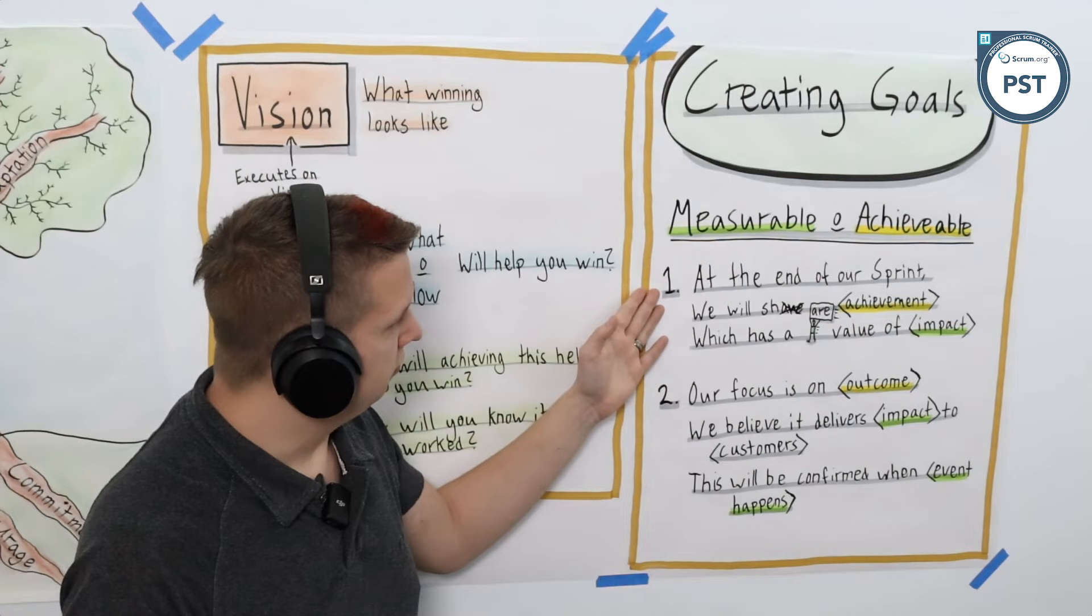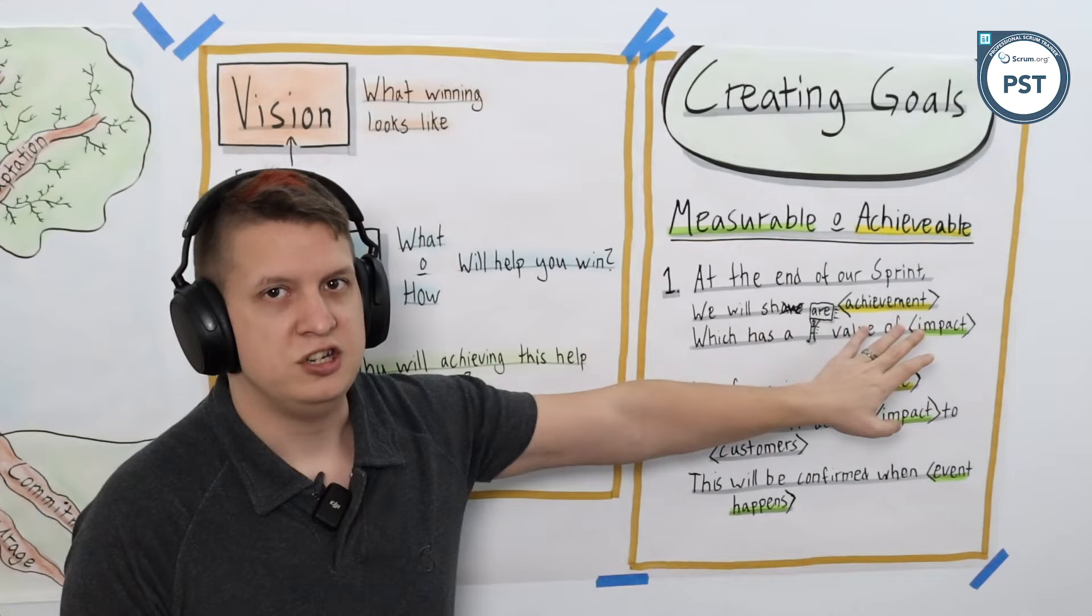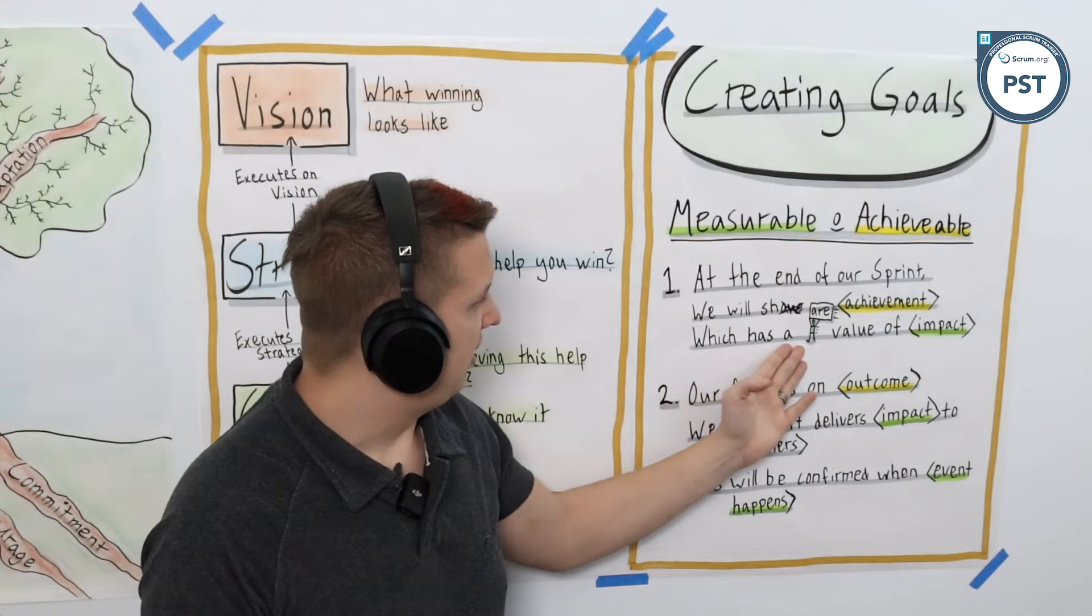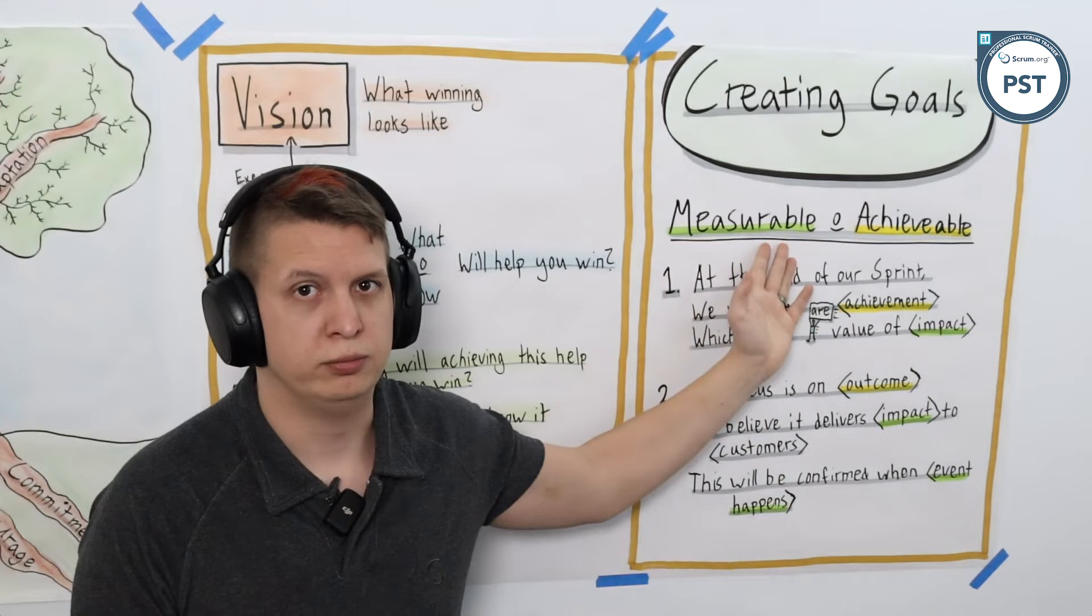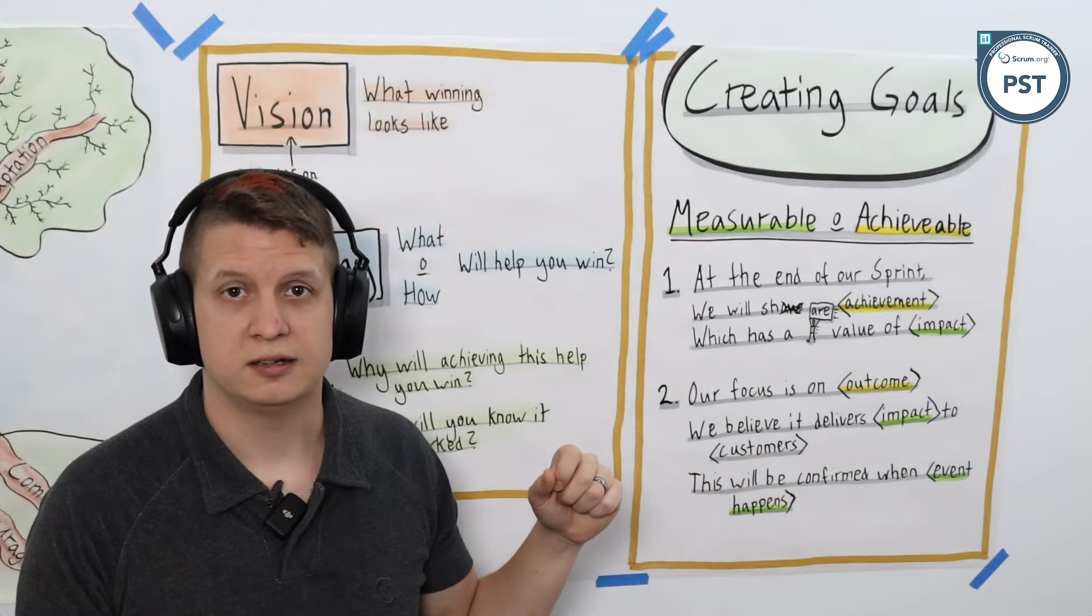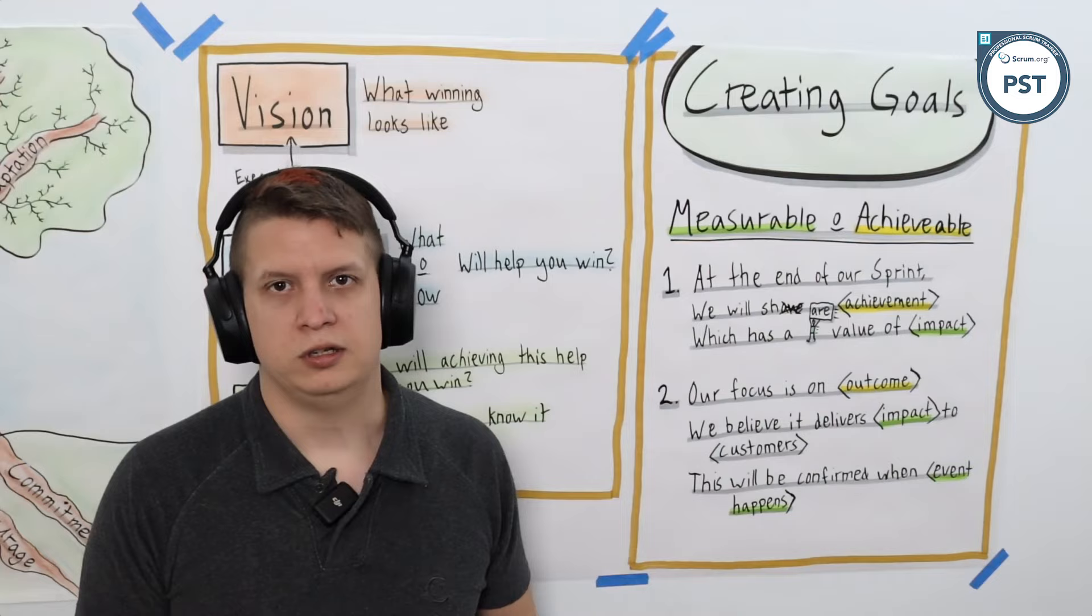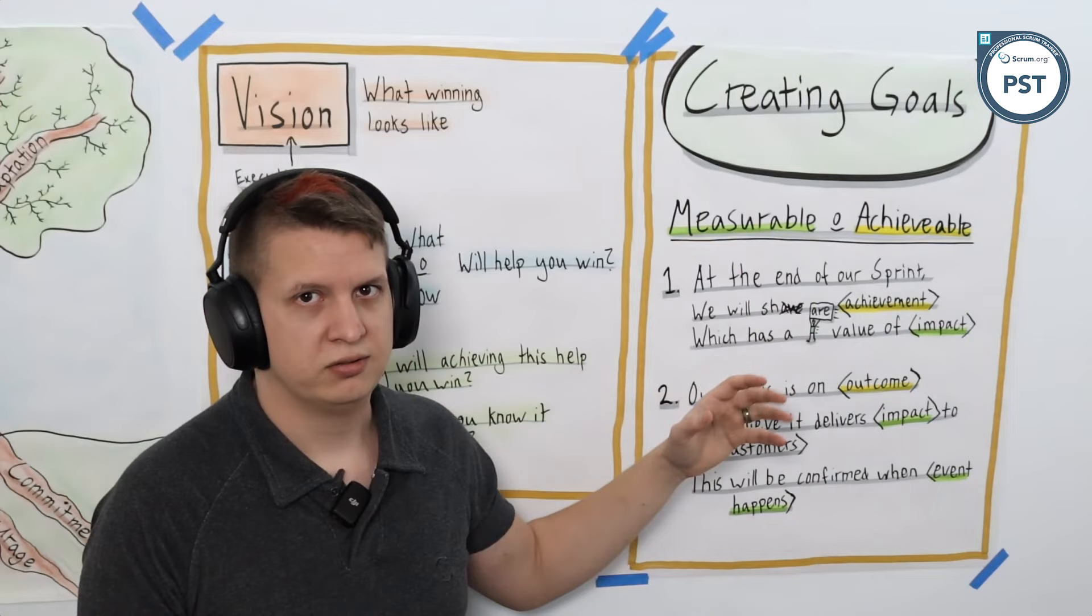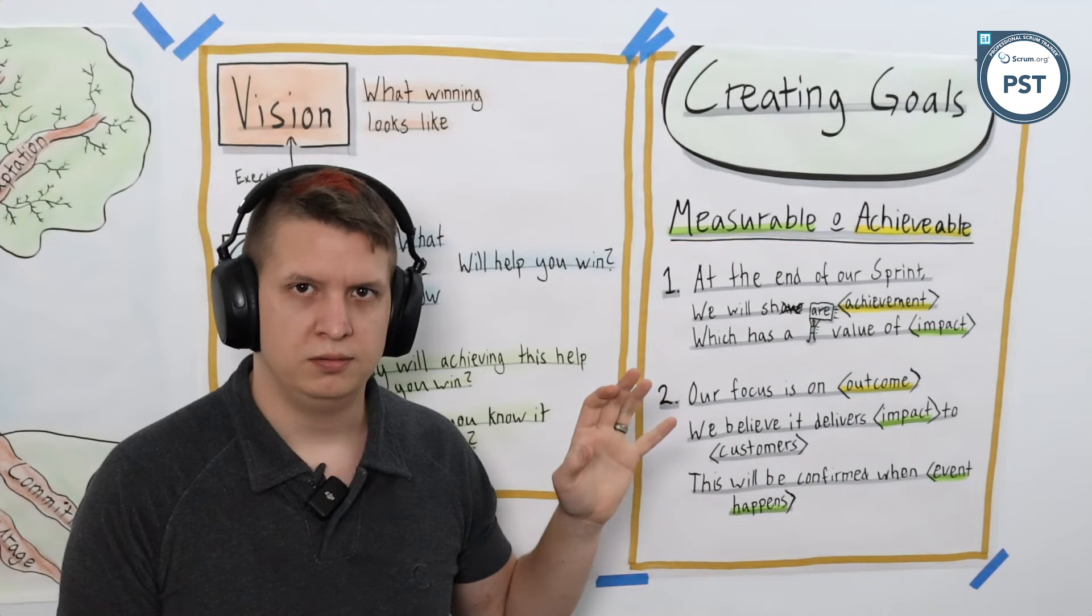So first of all, number one: at the end of our sprint we will share an achievement, which has a value of impact. Impact of course being measurable. It could be binary, it's either true or false, or it is something in terms of a percentage improvement, a point improvement, some kind of measurable impact. And I like this one because it's focused, it's to the point. This is what we're going to share and this is the impact it's delivering. This is what we're doing, this is why it's valuable, to the point, concise, solves the problem fantastically.